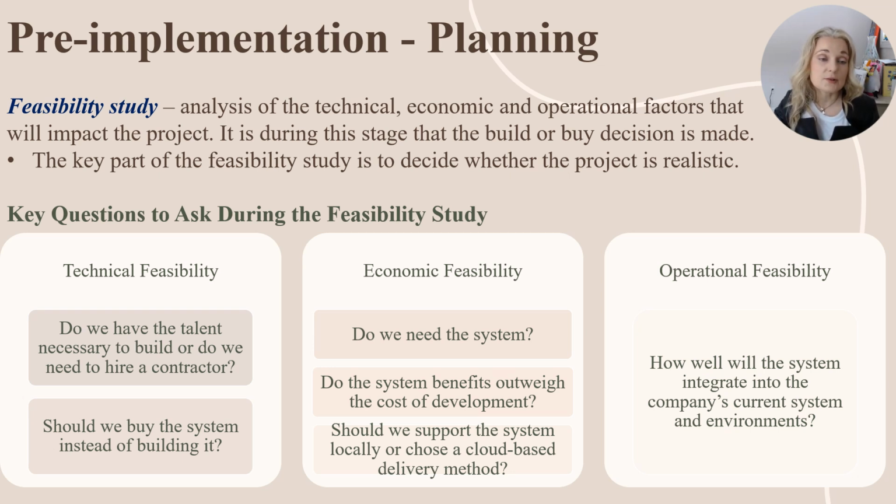So the questions you're asking: do we have the talent necessary to build the program? Or do we need to hire a contractor to perform it for us? And then, should we buy a system instead of building it? So you're questioning that make or buy decision right there. Then you're looking at the economic feasibility. So do we need the system? Do the benefits of the system outweigh the cost of development? Should we support the system locally or choose a cloud-based delivery method?